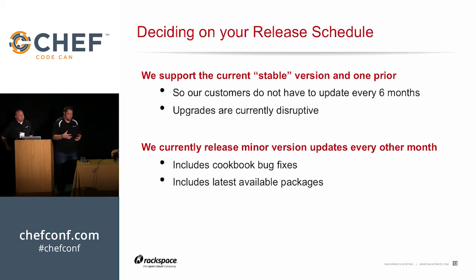We try to do every other month releases on this, where every 60 days customers are getting this. And because we're doing 2, we flip-flop it. So Havana's on a 60-day cycle, Grizzly's on a 60-day cycle, but they're not on the same one. They flip-flop, right? So go do Havana, go do Grizzly, go do Havana, go do Grizzly. This has worked pretty well for getting it in the hands of customers.